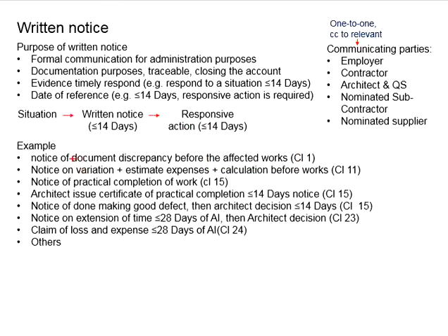Let's say now there are variations involved. You have to send in the written notice notifying the variations, estimating the expenses, plus the calculations before the works. Now this one is also limited by a certain time frame.